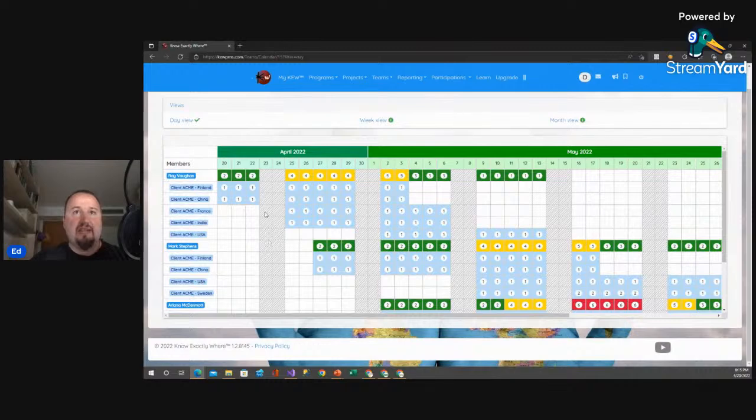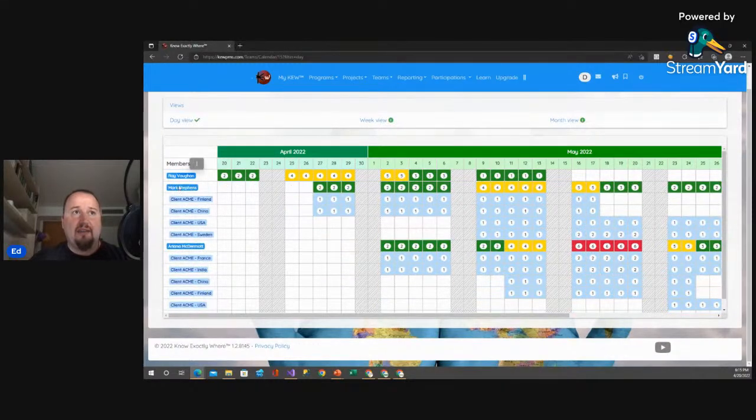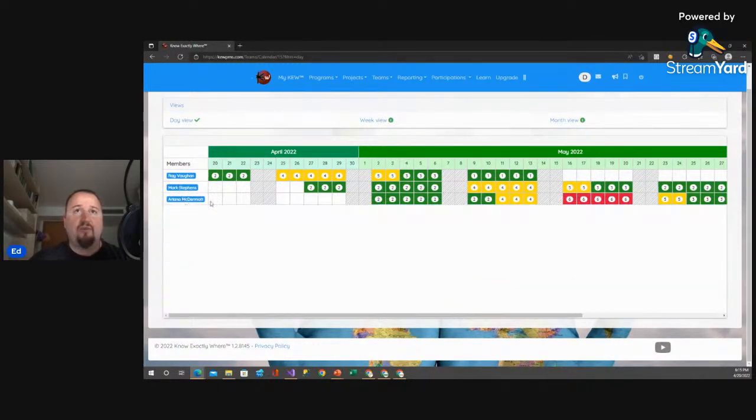So here you see the detail of, okay, this is starting either yellow, with 4 or 5 things happening at the same time, or 6 or more, which becomes a red tag. We're in the process of adding a configuration so that each member can be defined with what is considered too much, or what's considered green, yellow, or red. It's something that's upcoming as well. But for now, it's up to 3, 4, 5, or more than 6 things happening at the same time that you see this color coding.